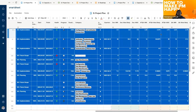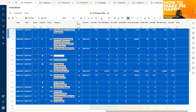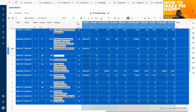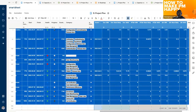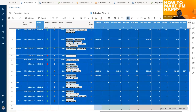We also have a couple of columns that help us estimate the work. The difference between this estimation and the start/finish date amount is similar to the difference between story points for a regular story and how many days a developer will spend implementing that story.